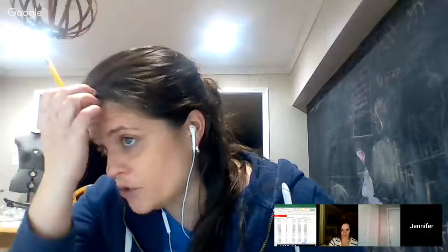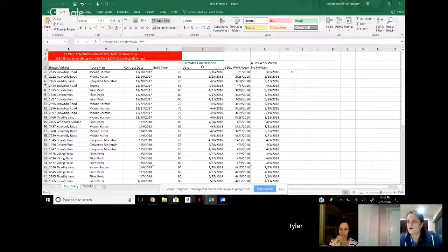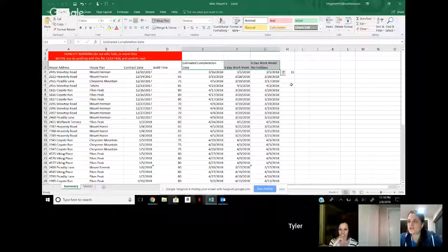So you're supposed to have 3 columns that you figure out. You have to do your completion date with normal work days, then the completion date where you're working Saturdays, and then a third one where you're working Saturdays and holidays.